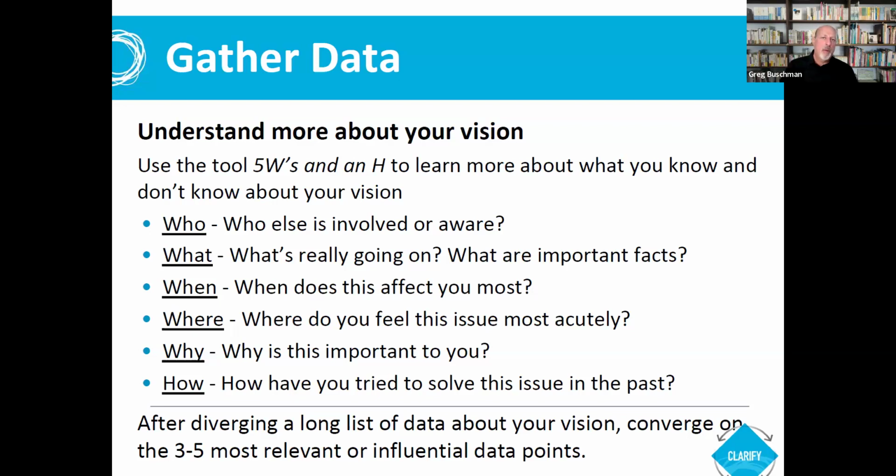And I mentioned that one organization who had a project that they failed at. They failed twice, 3 years ago and 5 years ago. They learned the creative problem solving process and how to work the 4 steps. And last year they had a 100% success with their project. And so it just goes to prove, just because something has failed in the past, what they did is as they looked at what they did in the past, they realized as they went through the process that they did not include 4 key stakeholders that were important.